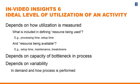The third thing is it also depends on variability. There can be variability that comes from the demand placed on those activities, and it can come from how the processes are actually being performed — the supply in terms of what is given to that task to work on, and how it's being worked on from a process perspective, whether following standard operating procedures or not. So if you want to account for that variability when calculating capacity utilization, you'd have to plan for a lower capacity utilization if you're expecting a lot of variability.